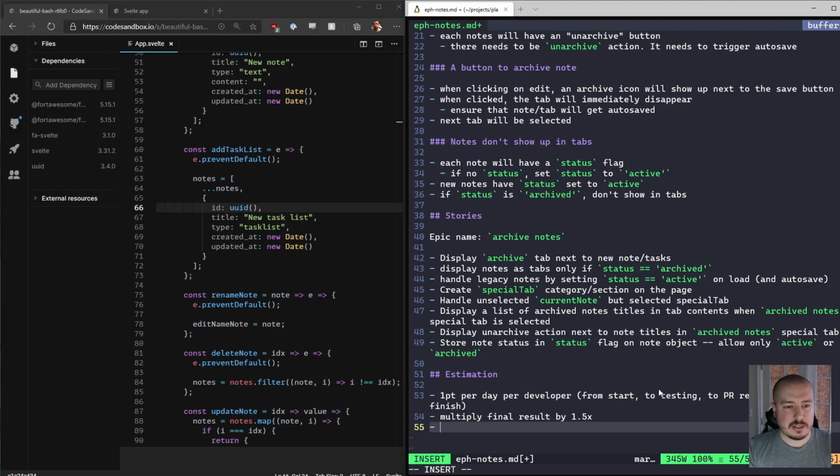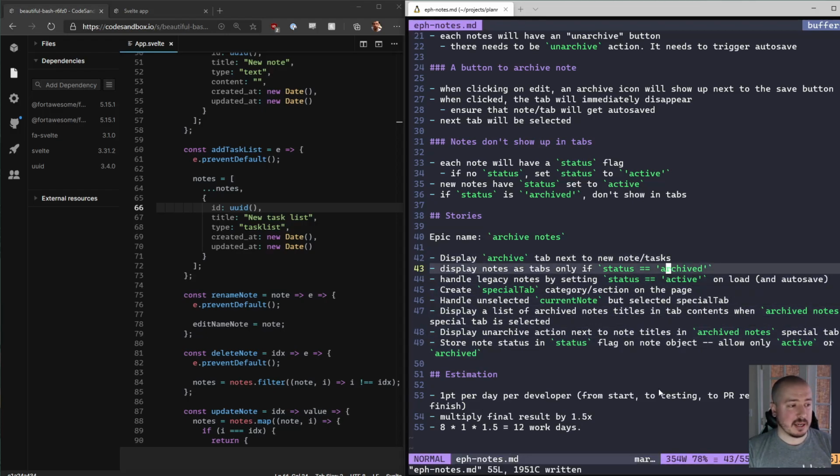So I have 8 stories times 1 point, because I'm just a single developer working on this, times 1.5, and that is equal to 12 work days. So that's about 2 weeks to get this done. Ooh, that sounds pretty yucky. You might be thinking, hey, why does it take you so long? I mean, it's a test project, but imagine if you're working on a much larger project, this might require a little bit more orchestration. But I think that this is a pretty accurate estimation.